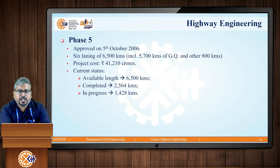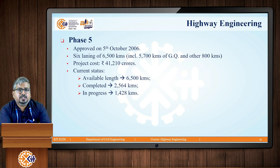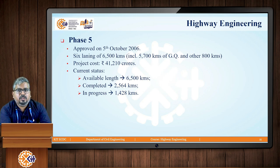Moving on to Phase 5, this was approved in October 2006. It involved 6-laning of 6,500 kilometers of road, out of which 5,700 kilometers were of the Golden Quadrilateral from Phase 1, and the remaining 800 kilometers were additional stretches. The estimated project cost was rupees 41,210 crores. The current status shows that out of the 6,500 kilometers requiring improvement, 2,564 kilometers have been completed, while work in progress covers 1,428 kilometers.